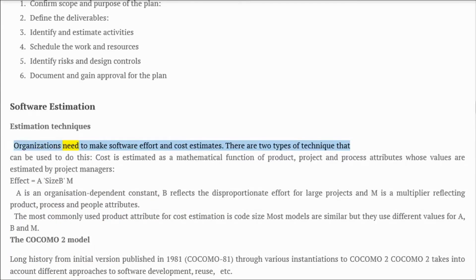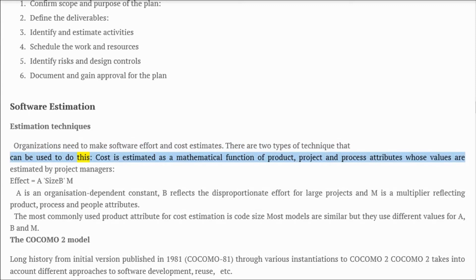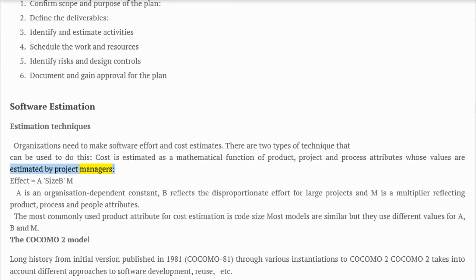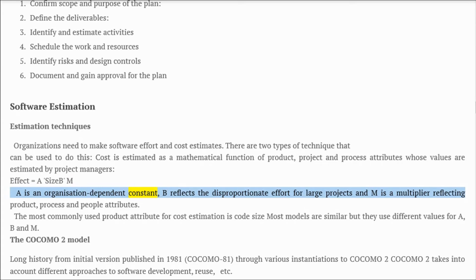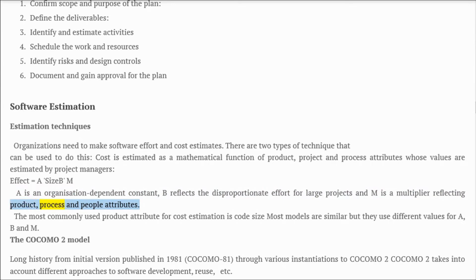Software estimation techniques: organizations need to make software effort and cost estimates. Cost is estimated as a mathematical function of product, project, and process attributes. The formula is: Effort = A × Size^B × M, where A is an organization-dependent constant, B reflects disproportionate effort for large projects, and M is a multiplier reflecting product, process, and people attributes.